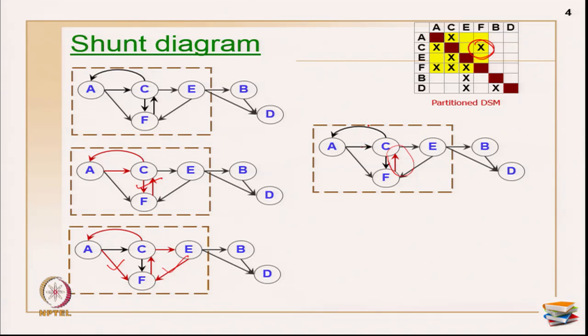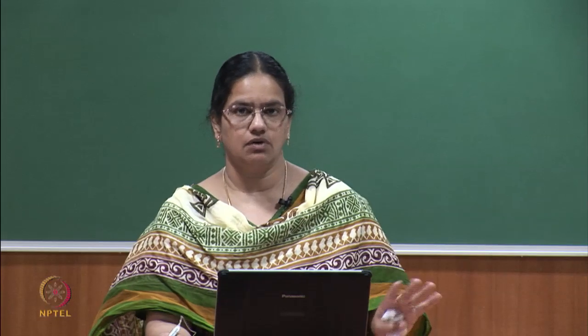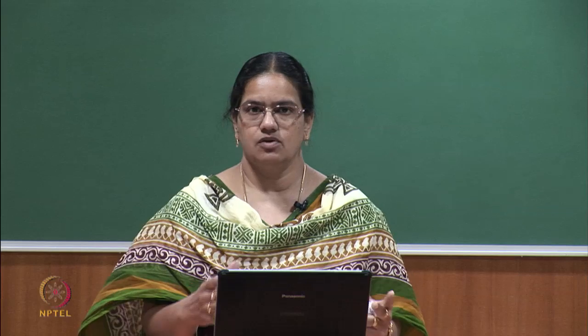If I have to choose one more tear mark in any of the two, then with two tear marks I have broken down all my cycles. So, I will have sequential or parallel activities only right now to start with, then repeat wherever you made assumptions to check, and then based on that you will get a duration for the entire process.